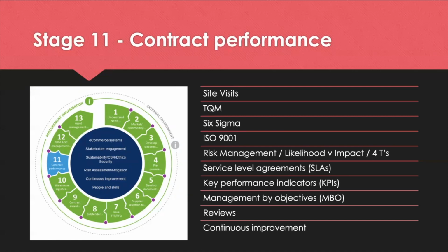So some of the tools and theories you can build in here are site visits, total quality management, Six Sigma, which is all about zero defects, ISO 9000, and the risk management approach, thinking about what risks might happen, what's the likelihood versus the impact, and the 4 T's being tolerate, treat, terminate, transfer. That's how you deal with a risk.